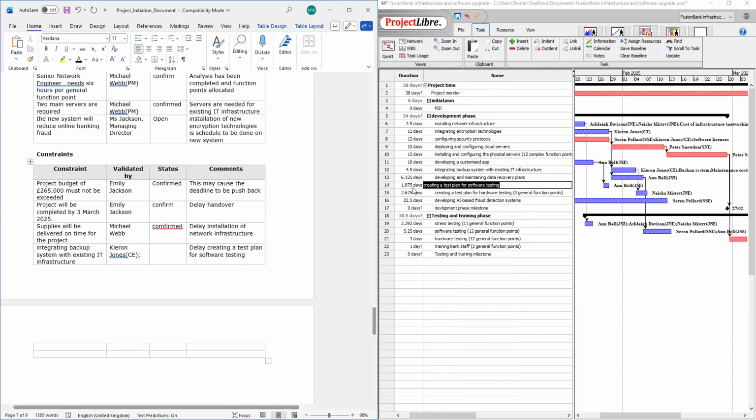So you see what's happening. It's affecting that one. And you can use these as your constraints. It's attaching. Notice they're attaching to all of these things here. You have the predecessors. If it has a predecessor to it, it can affect it. So this one can affect that one.